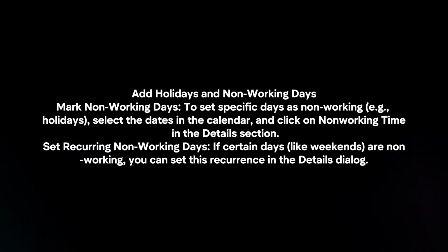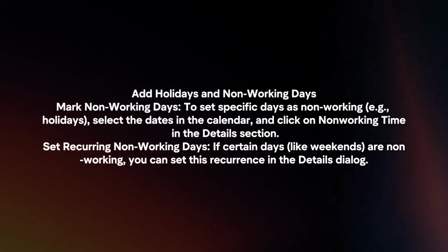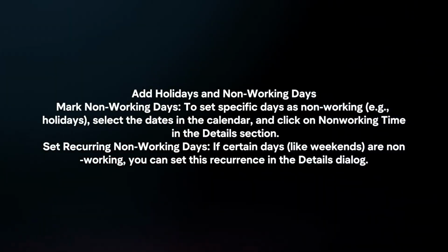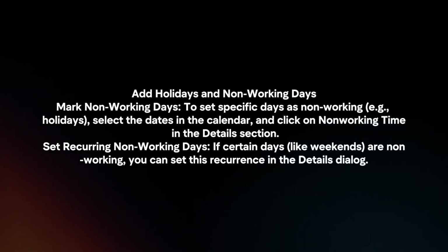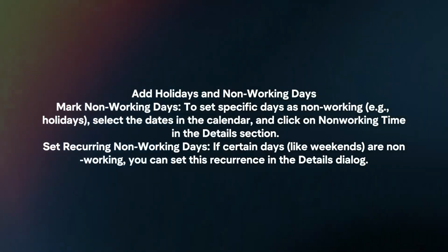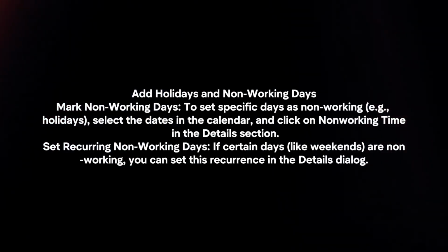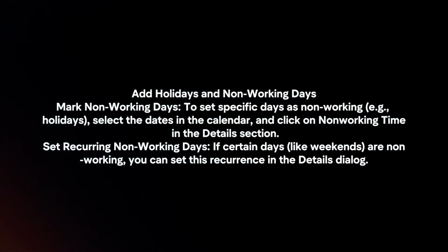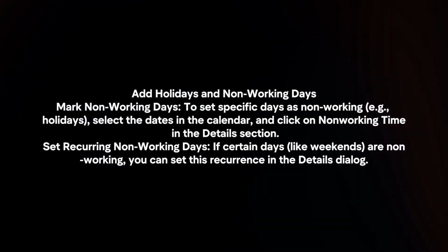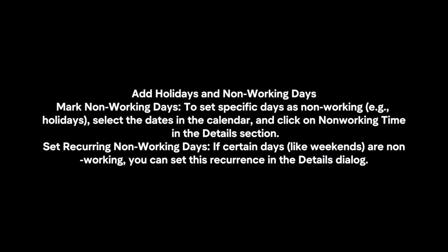Add holidays and non-working days. Mark non-working days. To set specific days as non-working, select the dates in the calendar and click on Non-working Time in the Details section. Set recurring non-working days. If certain days are non-working, you can set this recurrence in the Details dialog.